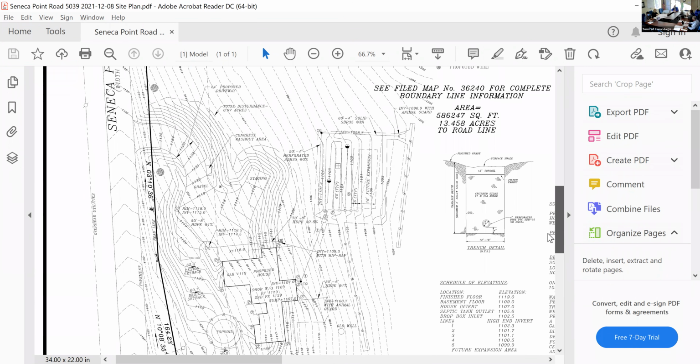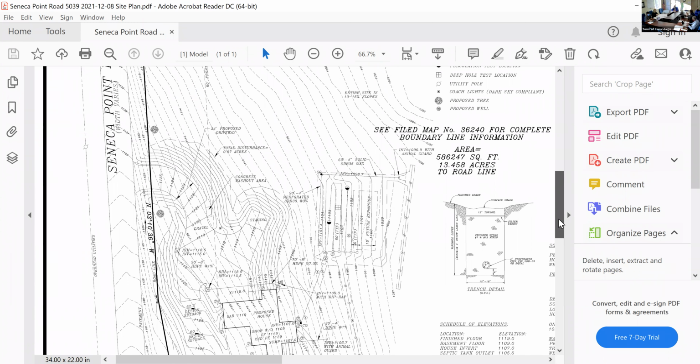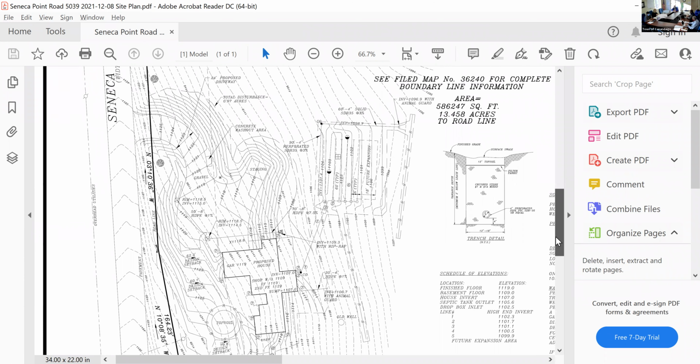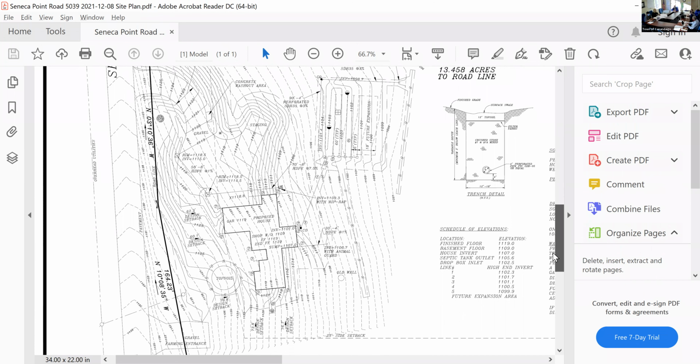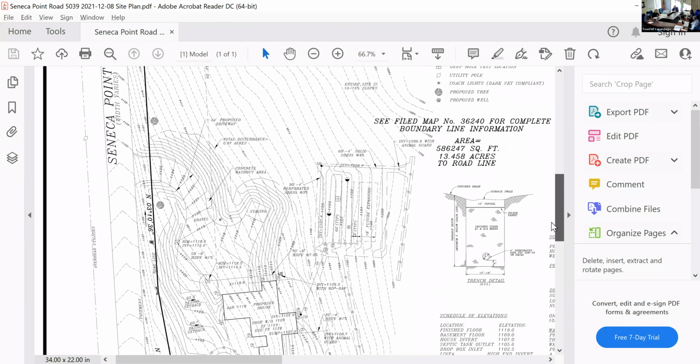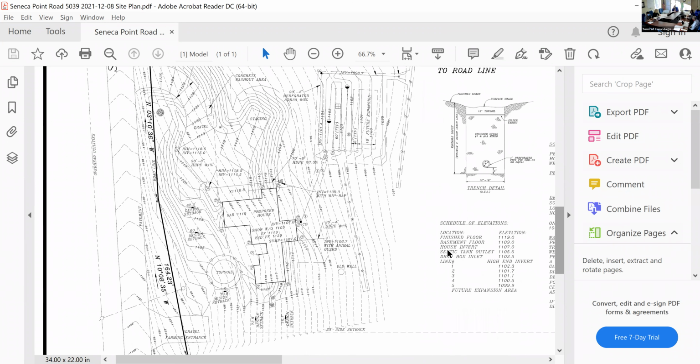The main reason why I'm gonna suggest that too is because the town, you're already over the other trigger, which is 20,000 square feet of disturbance. 20,000 feet of disturbance requires the site application to have what is called water quality mitigation measures shown. So like your roof would discharge to a rain garden, let's say. Those elements would be required to be added to the plan. They aren't. Okay, because you already gotta do that, just do it once and have it be done with the whole package. A lot of times that 1 acre trigger is what most communities would then require water quality functions to be provided. You already tripped that.